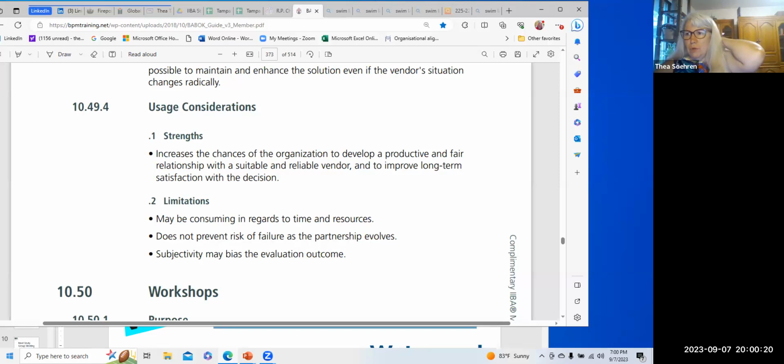The integrations, if you're asking some company to come in and provide, let's say, Workday. We had Workday come in and provide human resources, recruiting, payroll, and accounting modules. For us to get Workday installed, Workday is easy, right? It has everything in it. We were integrating it with a 30-year-old company that had homegrown systems. The integration was hellacious because they weren't designed to integrate with Workday. They were designed for something 20 years ago.